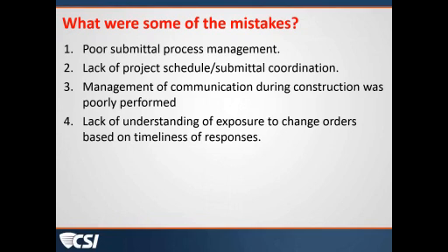Perhaps there's a lack of project schedule and submittal coordination here, where things are coming in too early or too late. Certainly that submittal is not one of them, but I have been in trailers where the submittals were brought in 2 boxes, and they may be 20% of the submittals that are going to come in on the project, and they were brought to the pre-construction conference.